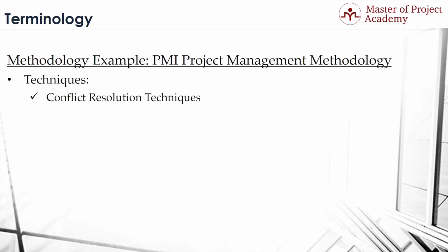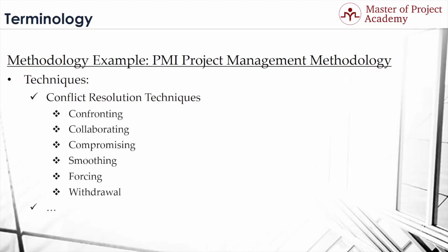Techniques are also covered under the methodologies. Conflicts are inevitable in a project, and project management methodology of PMI proposes 6 common techniques for conflict resolution in a project. These are confronting, collaborating, compromising, smoothing, forcing, and withdrawal. Depending on the situation, appropriate conflict resolution technique is applied respectively.